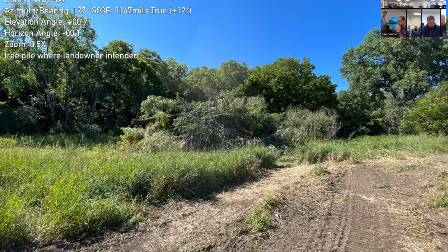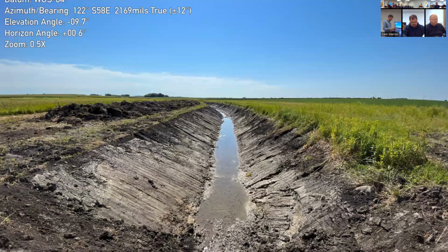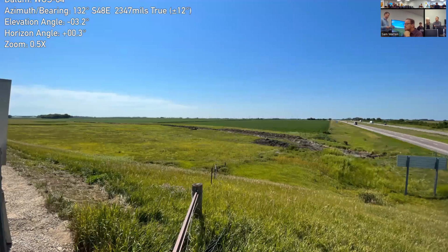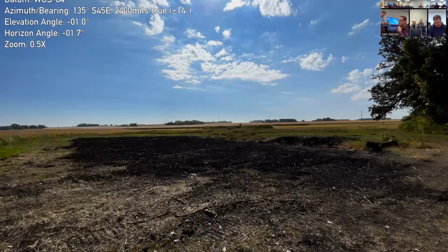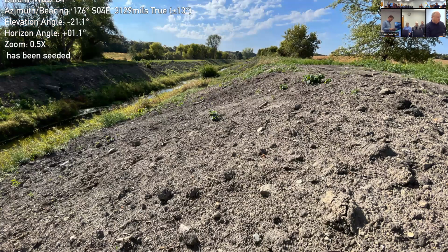Then we also had some grass and some tree land down on Tassler's land. We did the staging area there for the clean out. We estimated 1 acre. We recommend $300 an acre for land and grass production, kind of a rental agreement. And right south of Joanne Tassler, the James Nelson Revocable Trust, we had about 1/2 acre outside the right of way. All the other work was contained in the right of way limits, 50 feet each side.